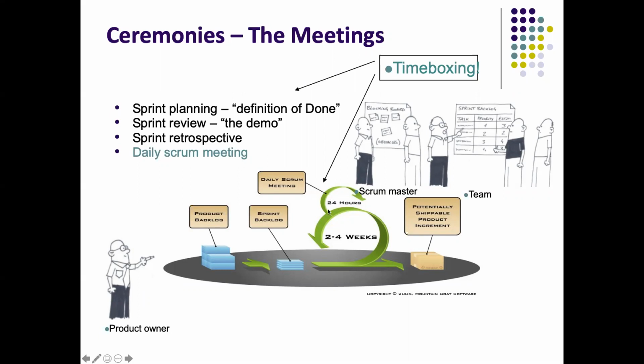The daily Scrum meeting is a meeting that happens within the Scrum team where everyone comes. It's a stand-up meeting, very short duration, no PPT, no slides, nothing. Just answer three questions: what you did yesterday, what you plan to do today, and if there are any hurdles or anything that you need help with. Everyone in a round robin fashion answers these questions and moves ahead. There should not be any discussions in this daily Scrum meeting. It should be straightforward. If required, you can set up a separate meeting to do the discussion. But at a high level, that is what your Scrum meeting is.